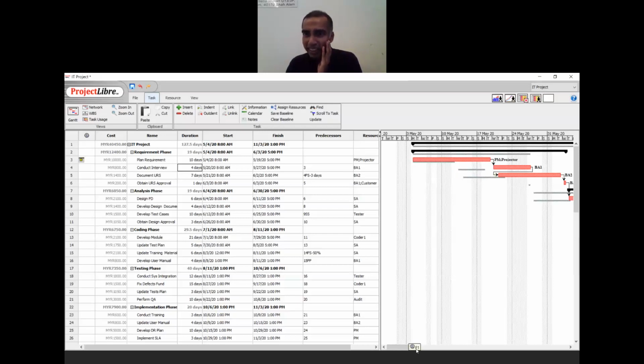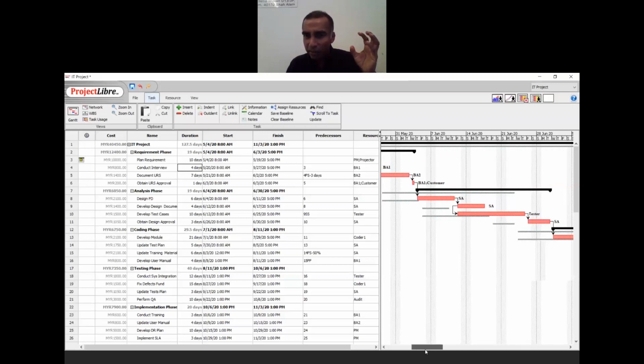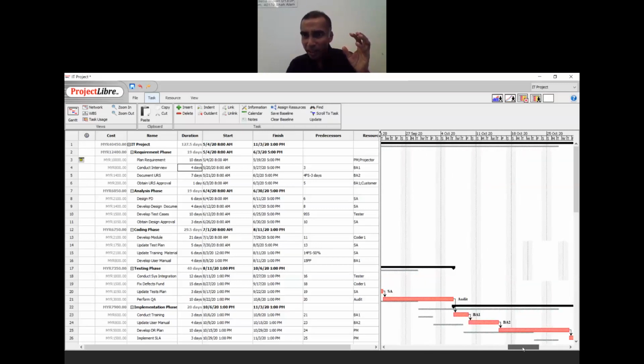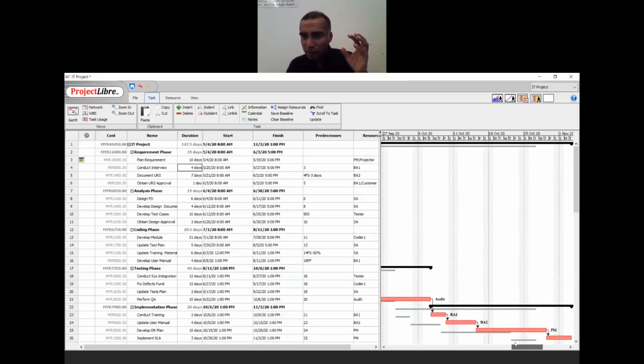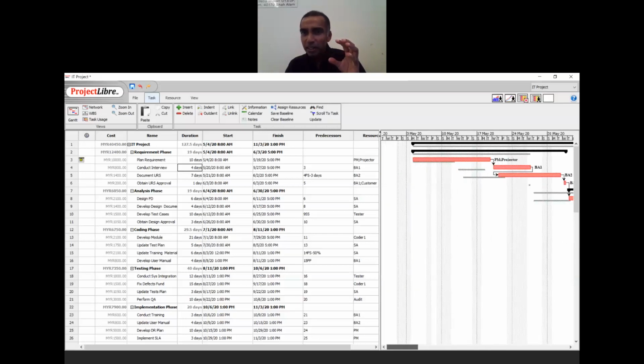Because my project is delayed by 5 days, the gray color here remains, because that's your originally planned date, right? So you can also expect the end of the project to be delayed. This is originally where you're supposed to finish, but now you're delayed. This is the beauty of baselining. With baselining, you'll see tracking. That's one way of tracking.